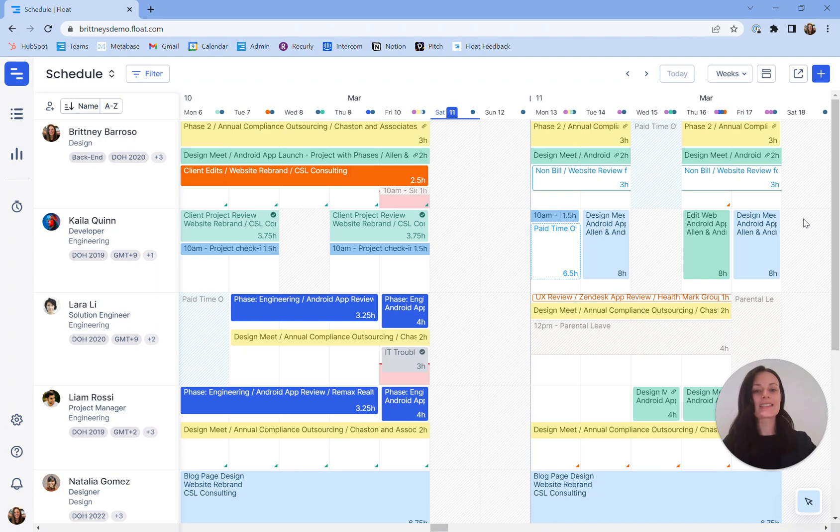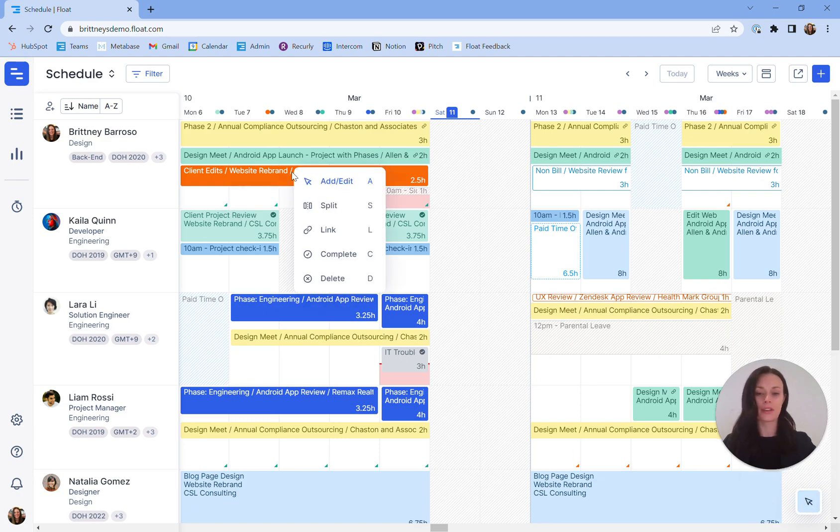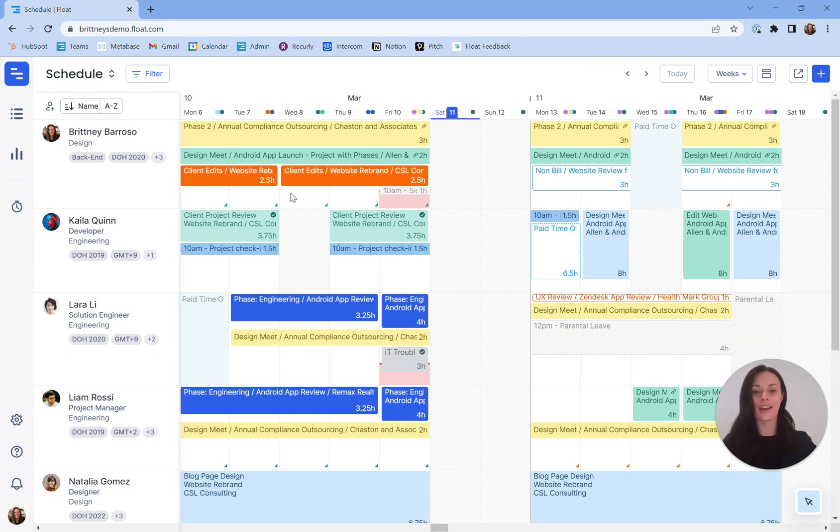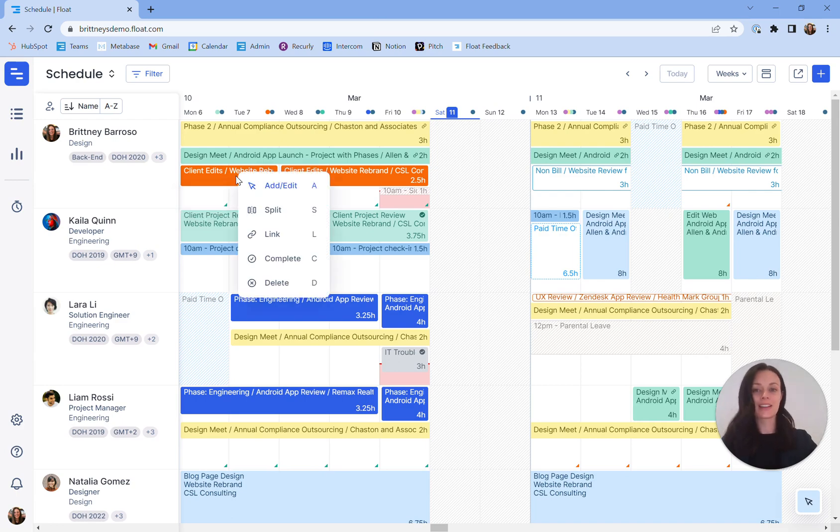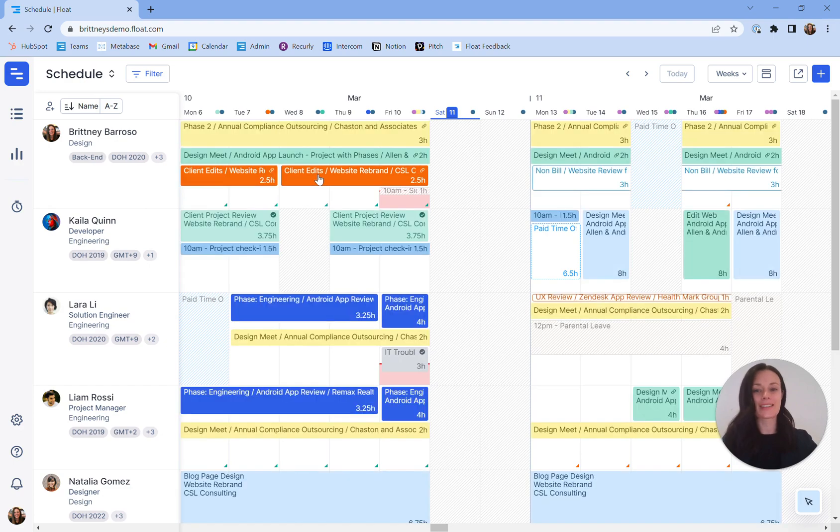Finally, let's consider how to split, link, and delete any tasks found within your schedule. Your first option here is to use the menu on the bottom right hand corner. Additionally, you can right click onto any project that you would like to pull the edit menu up for. Splitting a task will allow you to separate tasks for scheduling purposes. You can choose where you want to split a task and when you're complete, go ahead and press escape to remove the editing menu. Linking tasks allows you to create group dependencies between one or more tasks. Once the link is complete, press escape to exit out of the menu. You'll see that these now indicate they're two linked tasks creating a group dependency.